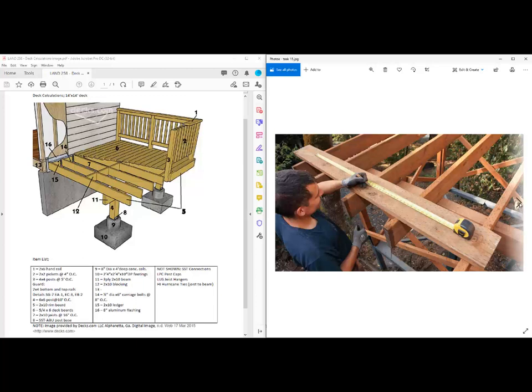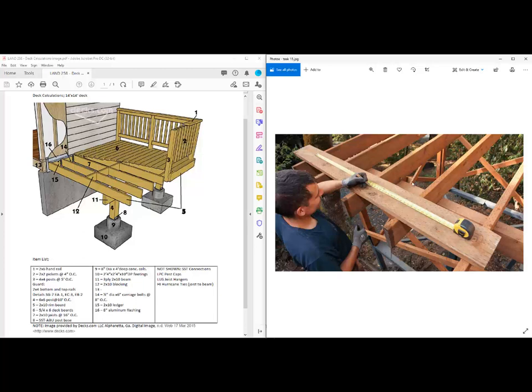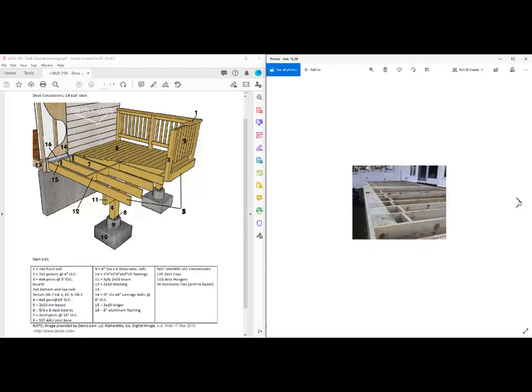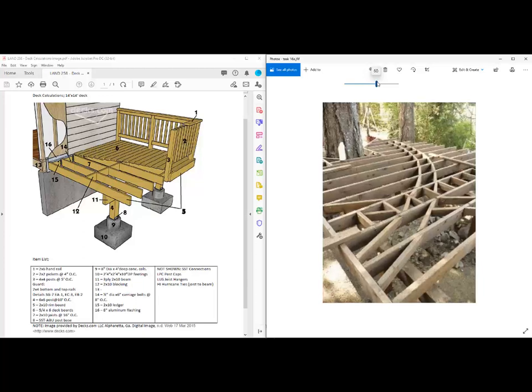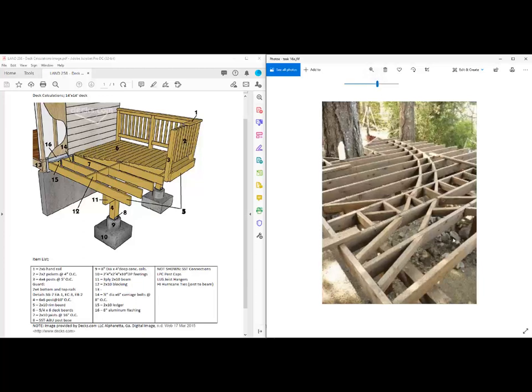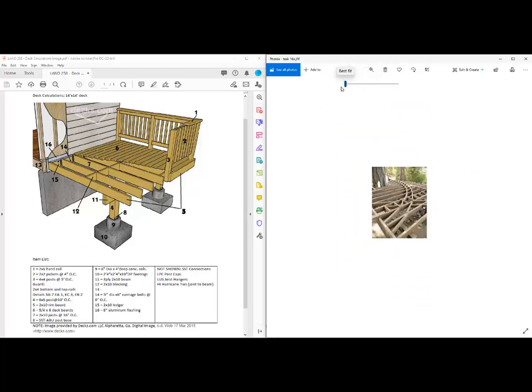Once the joists are attached - this is task number 14 - we then attach the rim board. The rim board is task number 15. You'll notice that all the end cuts - typically you put in all the joists and then straighten out the cut right along the end - are finished off with the pressure-treated chemicals used to protect the ends of the wood. Then we attach the rim board to that outer edge. Task number 16 is installing all the blocking. In this case, they've got blocking set up for their edge treatment. You can see they've installed the blocking sideways to provide a larger surface support for the edge treatment. They've got the holes for the posts in this particular case. Here's an example when you start getting into fancy curves or composite materials with inlays and the type of blocking you have to do - it's quite extensive. That's what's required to provide the correct support. The blocking in our particular case is task number 16.